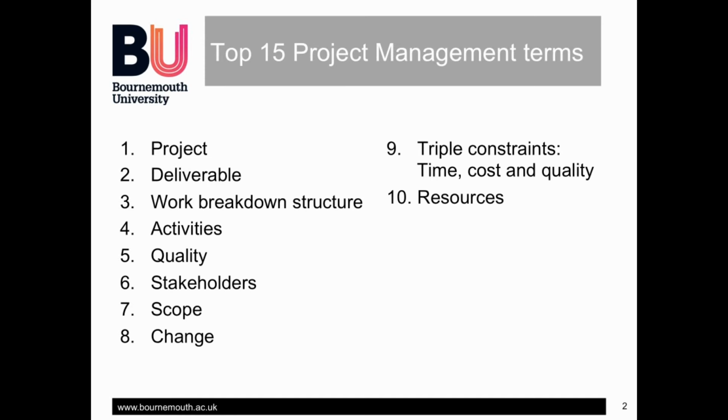We mentioned resources just now. Resources refer to people, equipment, commodities, and also money that is involved in the project. When you're putting together the budget, the estimate for the cost of the project in terms of its resources will comprise the budget. As people work on the project and you buy supplies, book bands, etc., you'll incur actual cost. Actual costs are the real amounts of time expended or money spent. Comparing the actual cost against the budget is a good way for you to be able to assess how the project is progressing and to alert you to possible changes that are needed.